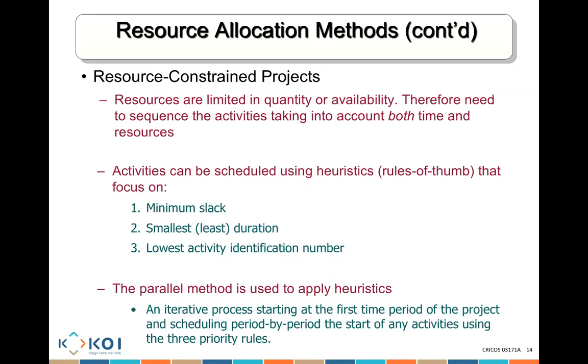For example, one activity might require a developer, one activity might require a tester. If I have an activity needing a developer for 1 day, and an activity that a tester needs to do for 6 days, I will have to finish this activity first, because otherwise the tester will be waiting and doing nothing. So you choose the activity that has the smallest duration.